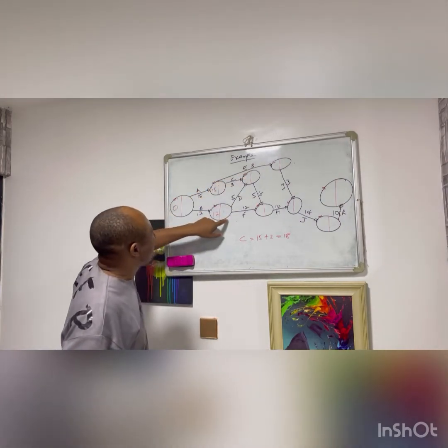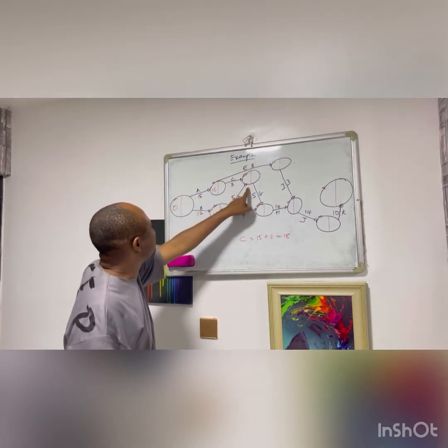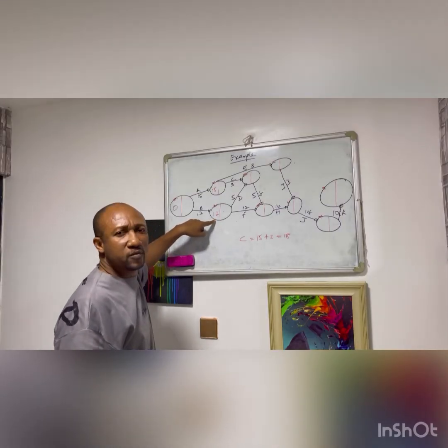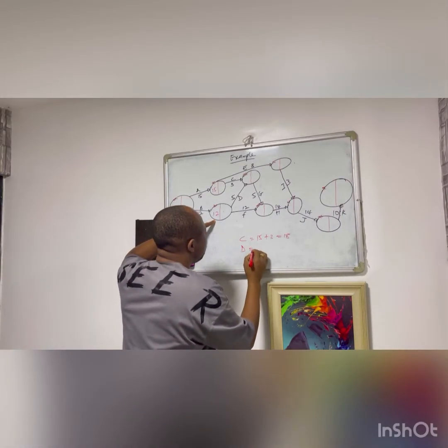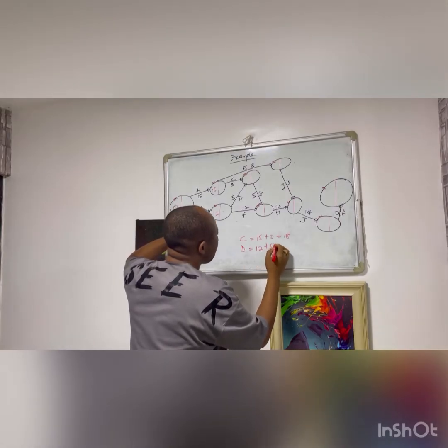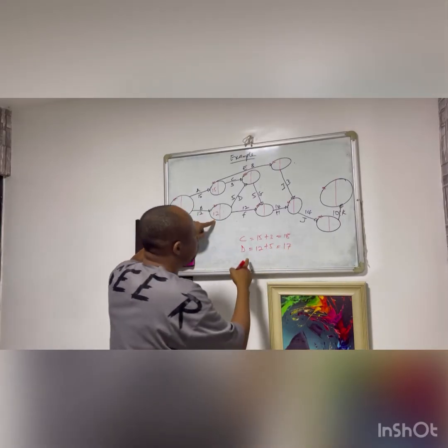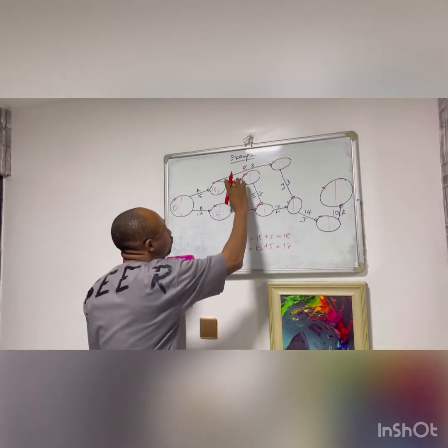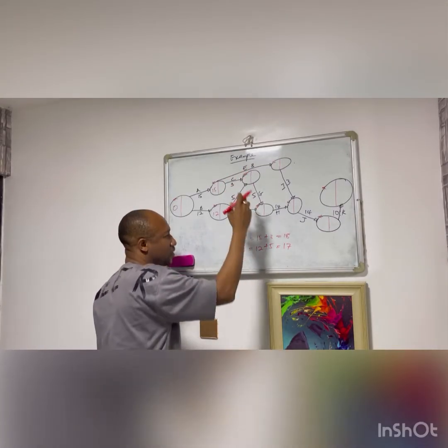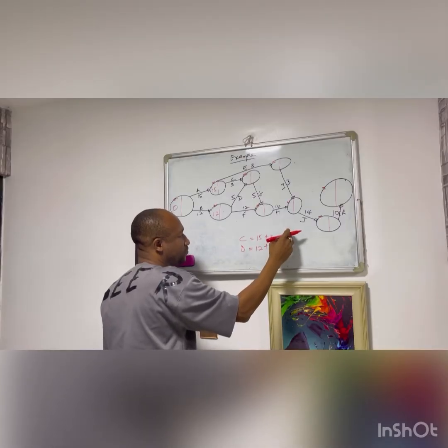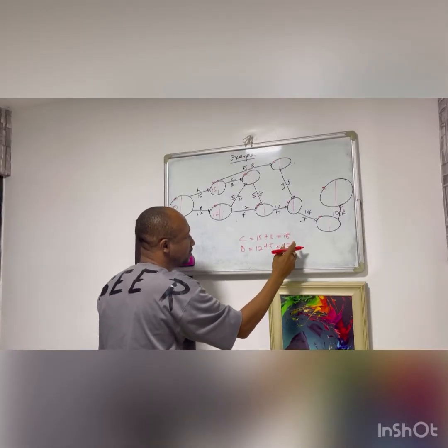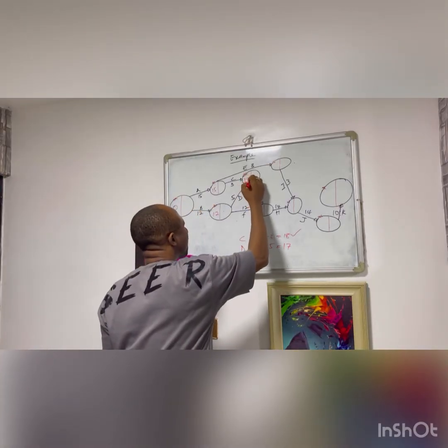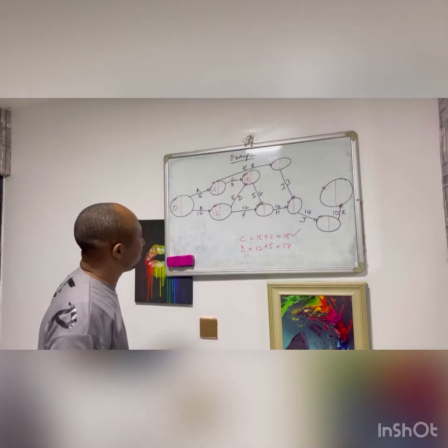Another activity is arriving here, which is activity D. Activity D itself is taking off on week 12 and uses 5 weeks, which means activity D will be arriving on week 17. So because these two arrows arrive here at the same time, and one arrives on the 18, the other on the 17, I'm going to be picking the highest of the two figures, which is 18.